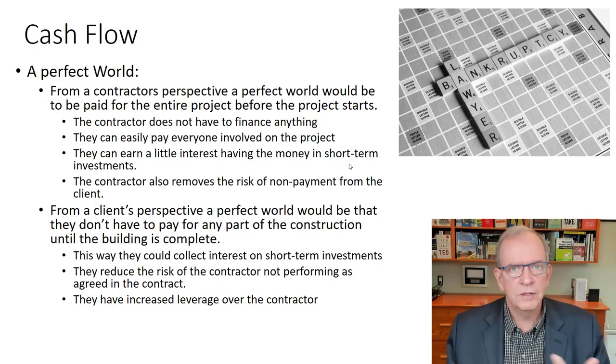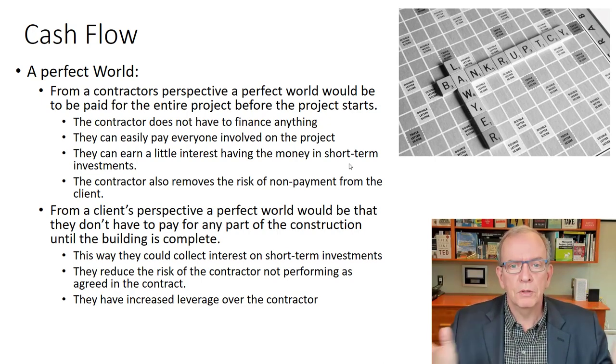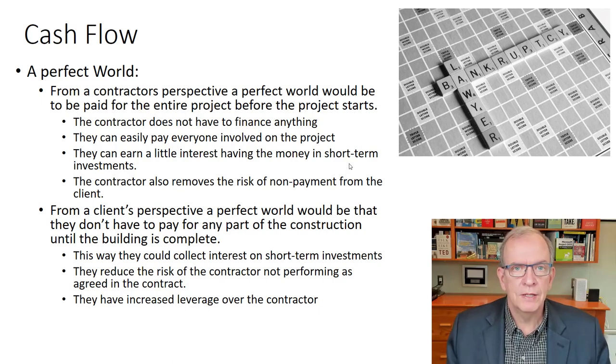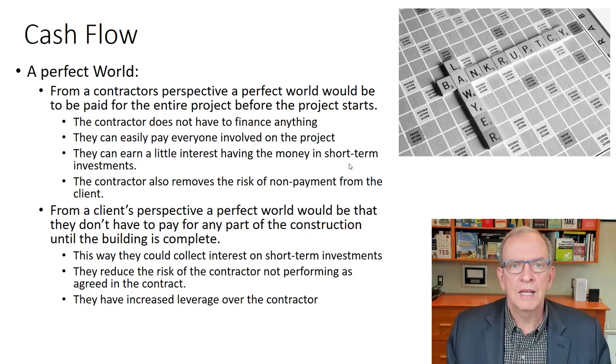Like in the province of Ontario, we have the Construction Act, which is a relatively new process where you're supposed to be paid within 30 days of invoicing. And part of that came out of everybody taking longer and longer to pay people. When I was a contractor, it was around 30 days. Then it went to 45 days. Then it went to 60 days. And it seemed like it was getting longer. Some were even extending it out almost 90 days, which is a very long time to wait for your money because you have to pay people.